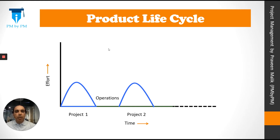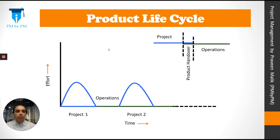In the case of a car, project 1 would produce the first model, it will be operationalized, and then after maybe 3 or 4 years another model will be introduced and operations will take over, going on until the car is retired. Projects are represented by a blue line and operations by a green line. At the end of a project the product is ready, but operations are not yet ready to take it over, so the project team hands over the product, operations take the knowledge base, understand the product, and start their work. There is a small overlap between projects and operations each time a new project is introduced and the product is upgraded.